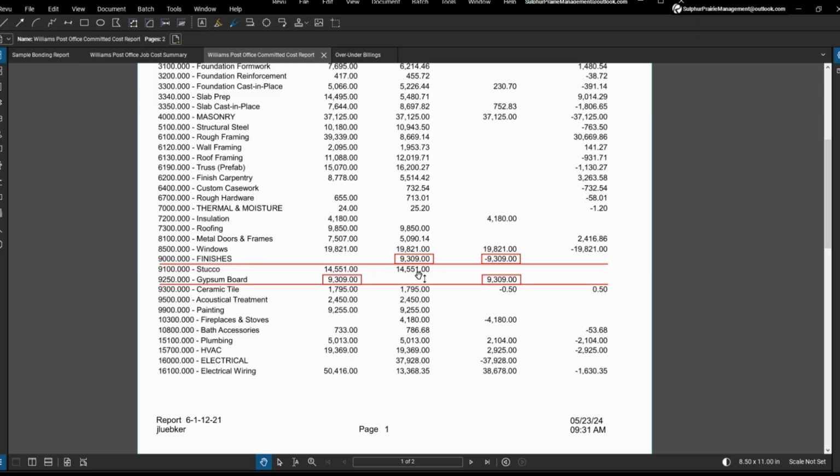So questions like, was there a notice to proceed in writing for a change order adding scope? Was there a scope gap in the estimate that we're responsible for? Or was the entire scope paid for but not applied to the PO separately, leaving a balance? If there are outstanding costs not accrued, a WIP report won't show it. Look at code 9000 for finishes.